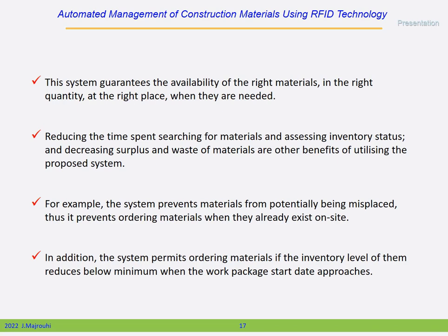For example, the system prevents materials from potentially being misplaced. Thus, it prevents ordering materials when they already exist on site. In addition, the system permits ordering materials if the inventory level of them falls below the minimum when the work package start date approaches.